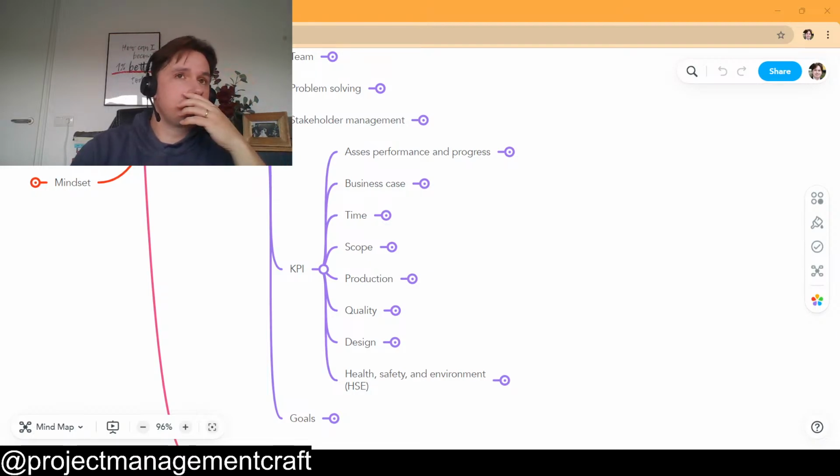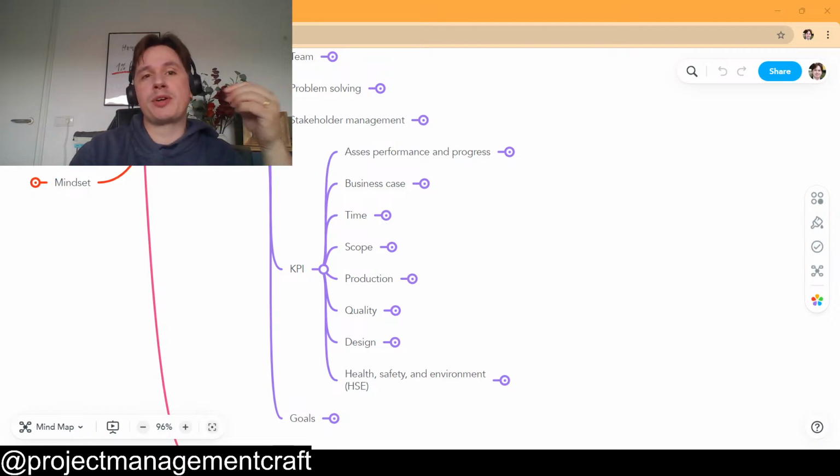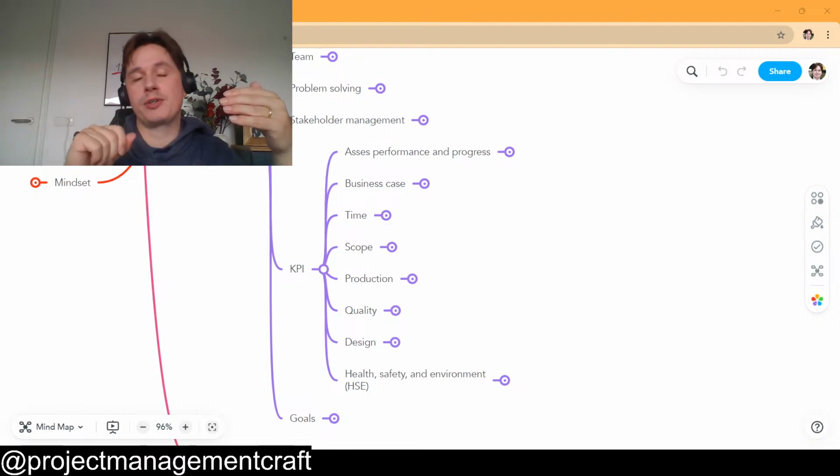You can see that in several different ways. For example, for progress, I just mentioned a few things, like people renegotiating deadlines. In the case of people renegotiating deadlines, you can also have a KPI that measures your progress, but also take a look at which revision of the baseline you're using.